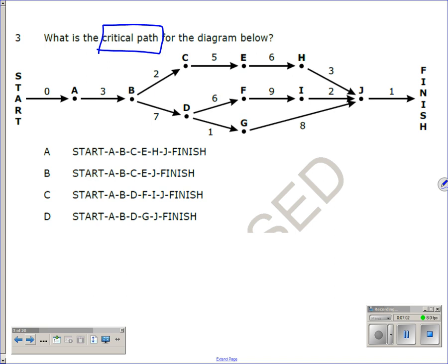Longest. Yes. People always mix that up. I think that's why this has a low probability of getting it right, because it's the longest path. The longest path ensures that I hit every single precedence relationship and I get my task done. If you go down any path shorter than that, you're not going to complete your task. So technically, the critical path or the longest path is the shortest amount of time it takes to complete the